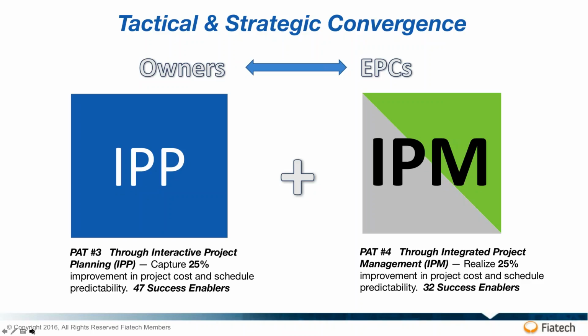And this project planning essentially gets them into a war room, face-to-face context, and they establish, first off, they get to know each other. They get to know roles and responsibilities. They get to know who's going to be responsible for what. And they start culling through the project and talking about what needs to happen before other predecessors and successors, and who needs to deliver what, and what the dependencies are.